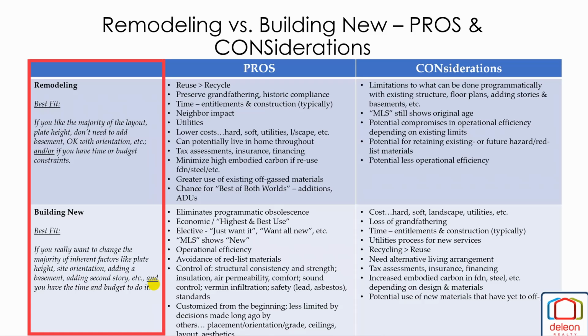If you really want to change. So a lot of times when someone has an old house, we'll hire a soils engineer to go inspect the soils, do a floor level analysis. If that floor is moved all over the place or it's unstable, that's kind of a deal killer right there.